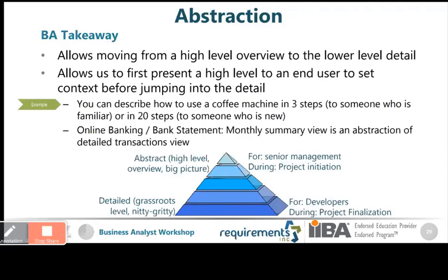Maybe you had like 10 ideas there at a high level. Well, whatever the project states, right? Maybe, to keep it simple, it has to be 50 pages worth of documentation to cover that entire breadth of the project, and it goes to the next level of details. That's called high-level requirements. So you have the vision document. Now you have the high-level requirements. The high-level requirements talk about all the product backlog items, all the features that are desired. And then you pick each product backlog item and it gets into acceptance criteria or detailed requirements.